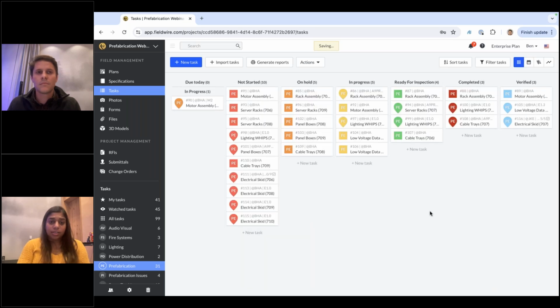Got it. That's really nice to see. So basically, from what I'm understanding, then you're using the same project as the field, and you're going ahead and creating these two new categories for your prefabrication, and just using the same statuses, creating a bunch of new tasks that are needed for your prefab, and then just tracking all of your prefab within the same project so that Yep.